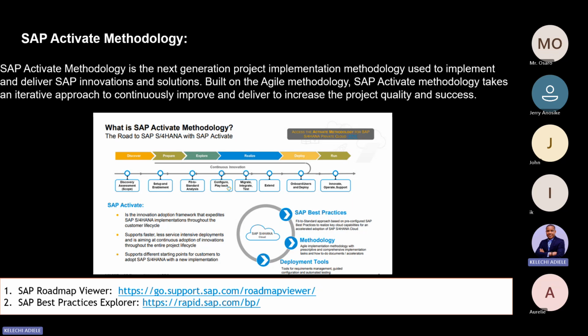And of course, that will lead to us engaging SAP to drive this project. The project charter empowers the project manager to start. The project manager has started, he has engaged SAP. The other thing that will give him the power to begin the project is the contract. Once the contract is signed with SAP, SAP will launch us into what we call the discovery phase.